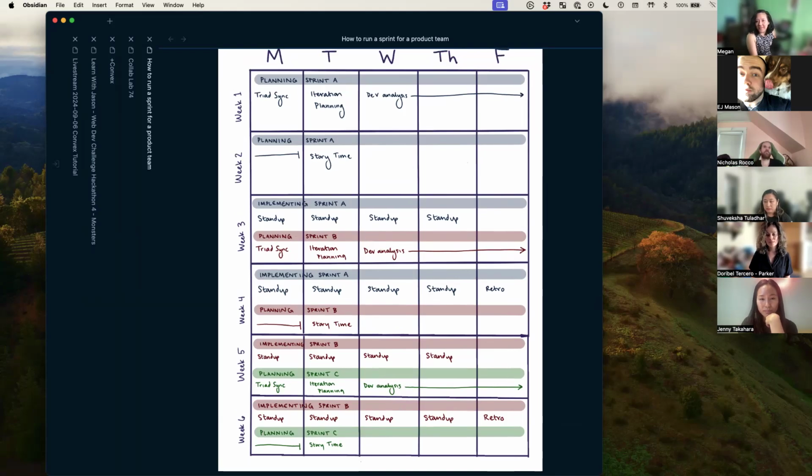Yeah, EJ, did you want to add something? Yeah. The only thing I want to say, which again may make this more or less confusing, is my understanding is a sprint is an agreed upon unit of work that your team sets out to do, which means it can be any length. And depending on how you want to slice this metaphorical cake, you could argue that our sprints are 1-week sprints. We've agreed to do this much work for a week, and our responsibilities in that week are doing those tickets. But as Megan said, on other teams you'd have more responsibility to plan, to estimate, to argue about points, and all those things. So the takeaway here, I think, is a sprint is an agreed upon unit of work at the cadence with which your team works, which can vary.